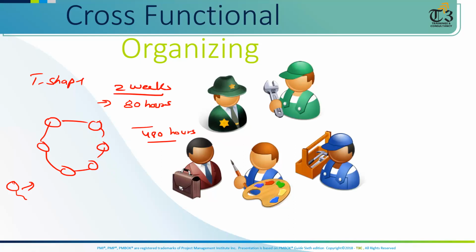Imagine we have the human problem everywhere. This human is sick, could not come, or has some problem going on with him or her, could be anything. So he's absent. If it were an I-shaped person and he's absent, your work would be stopped. So that's why we take a T-shaped team in Agile, because everything is 2 weeks. We cannot waste anything. We have to produce something in 2 weeks' time. So these guys will finish the work and compensate for this guy.